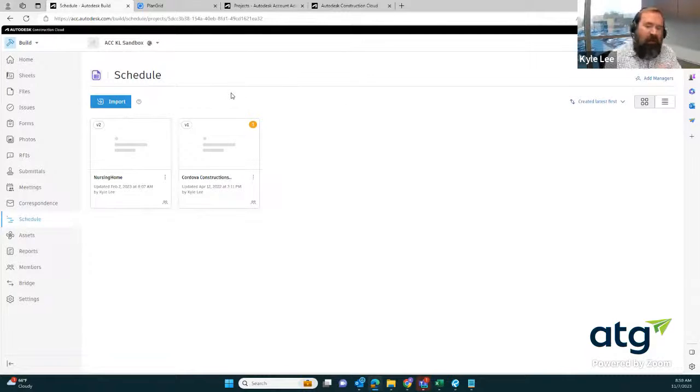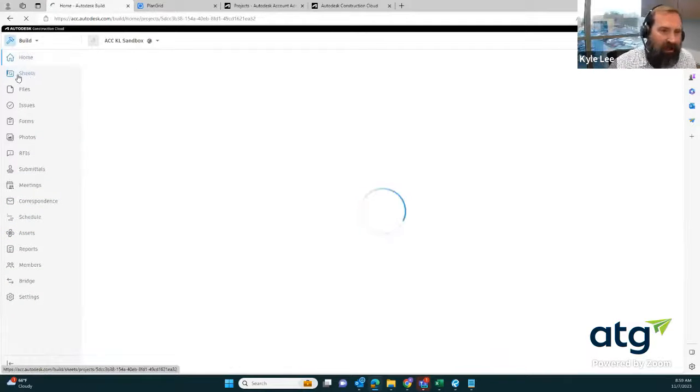Again, we're not going to give people on the project access to our scheduling tool. This gives us a way to output a static version that we can give them access to. Certain members may have the ability to make suggestions around potential changes. You can actually take those suggestions, pull that information back into your scheduling tool, update, and then bring out and start to produce different versions of your schedule along the way. Okay, so I don't want to get too deep in there. I know that I kind of trailed off.